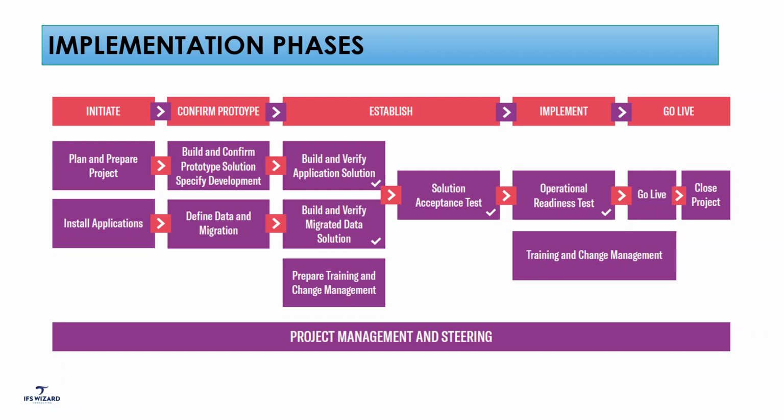So what we are going to do during the cutover phase is a trial balance migration, to see how the balance is going to look, and the client is also going to do some cleansing between the establish and the implementation phase. After that, we discuss if the customer needs any end user training, and we are going to support that as well. And then what is the handover process after the go live. We can discuss all those elements in the implementation phase.